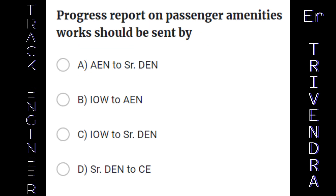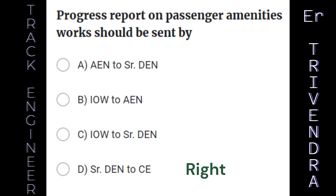Progress report on passenger amenities works should be sent by: A. AEN to Senior Divisional Engineer. B. IOW to AEN. C. IOW to Senior Divisional Engineer. D. Senior Divisional Engineer to Chief Engineer. The right answer is: Senior Divisional Engineer to Chief Engineer.